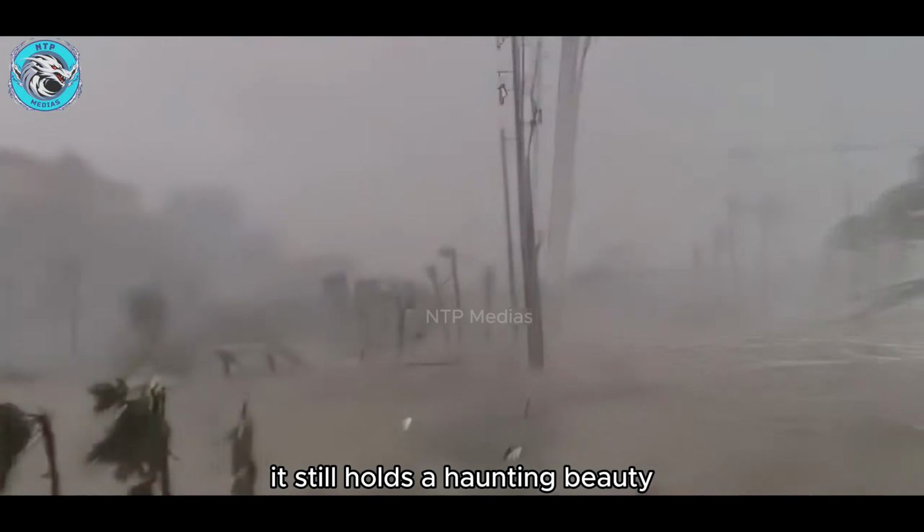Despite the flooding below, people above seemed unfazed, wandering around as if nothing happened. This nonchalance could lead to significant losses, far beyond initial expectations. Once the flood waters recede, the site will need to be drained and desilted before construction can resume. The delay and damage could incur direct losses and additional costs from construction delays.